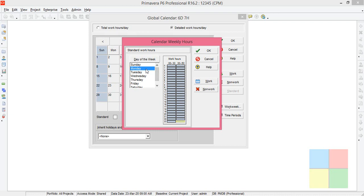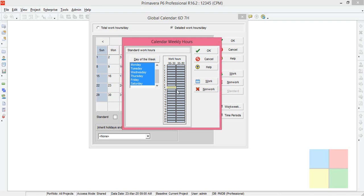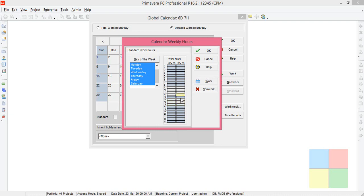Now let's make the main changes. We want six day seven hours, right? Monday to Saturday, six days, I select it. Then the working hours I need to select. We know nine to one, select nine then hold Shift, 10, 11, 12, 1, make it working hour. Again one hour of break here, then two, three, four, five, three hours here. So nine to one and two to five, seven hours of working day for these many days except Sunday.